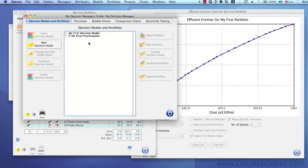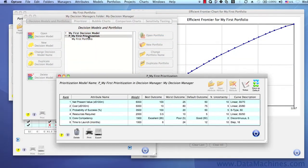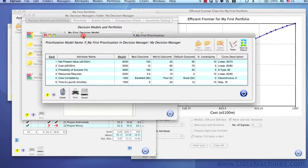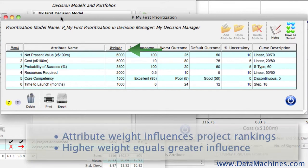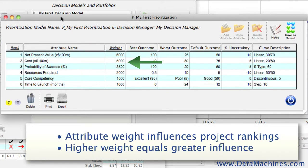So, let's take a look first at model uncertainty. When we open up the decision model form, we can see that each attribute has a weight associated with it, and that the weight designates the relative influence on the project rankings in the portfolio. The higher the weight, the greater the influence. For example, an attribute with a weight of 2,000 has twice the influence as an attribute with a weight of 1,000.